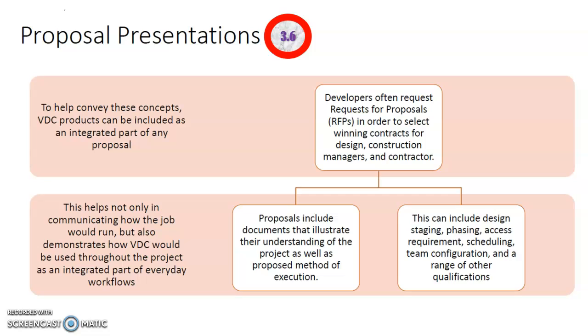Developers often request proposals, or RFPs, in order to select winning contracts for design, construction, and the managers and the contractors. Proposals include documents that illustrate their understanding of the project as well as the proposed method of execution. This can include design, staging, phasing, access requirements, scheduling, team configuration, and a range of other qualifications.